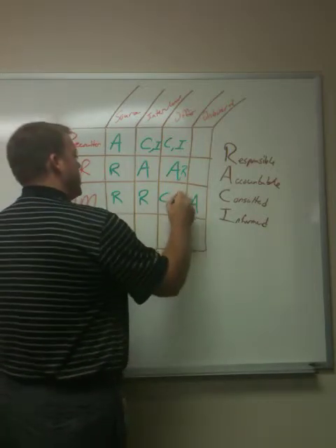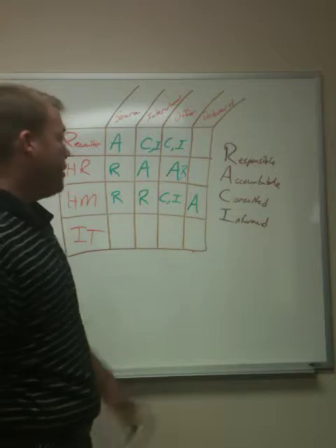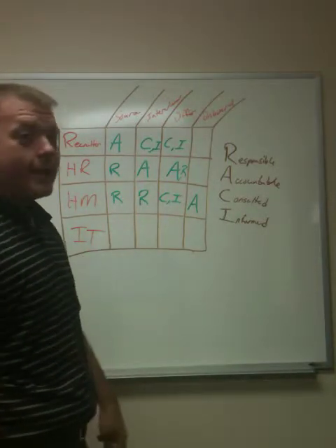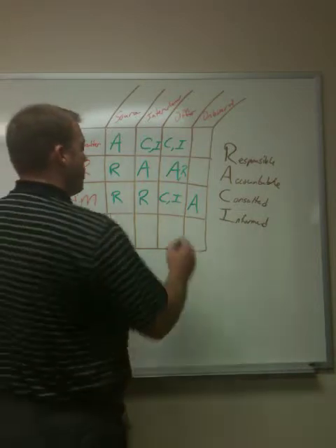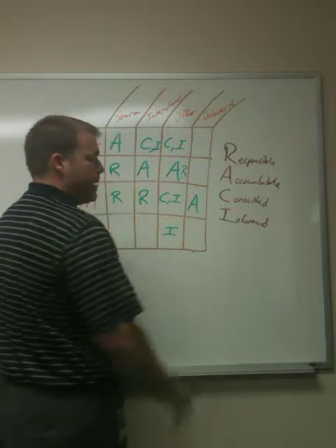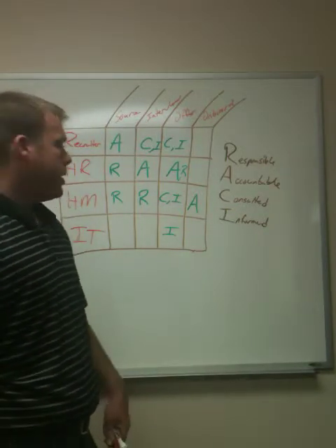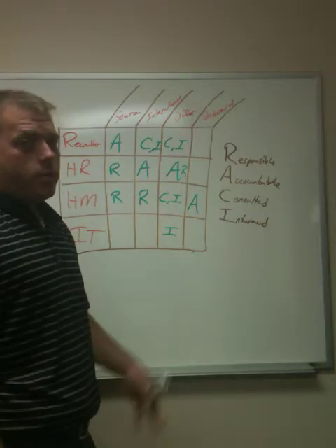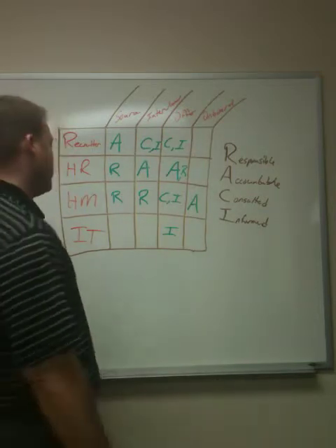The hiring manager will also be informed. Some organizations, the hiring manager might be doing the offer themselves, in which case that chart will look a little bit different. At this point, IT might get involved. In this situation, we're going to say that they are informed after an offer is made. That's because we're going to assume they'll say yes, because who wouldn't want to work with you, right? IT wants to jump in, they want to start building out systems, want to start getting network access set up, all the things we want to do prior to first day, which kind of leads us into onboarding.